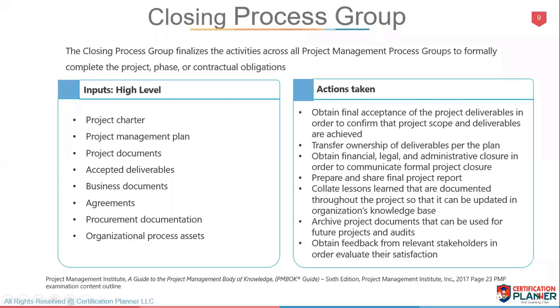And last but not least, if everything goes well, successfully or unsuccessfully, for that matter, because we still have a closeout when we get into the closing of a project, because a project could be terminated earlier due to any number of factors, as we've discussed earlier. And when that happens, you're still going to go through closing out a project. So please keep that in mind. Just because a project gets terminated earlier does not mean you don't close. It may affect how the processes take shape, or which processes are more important than others, but it does not preclude you from going through a closing.